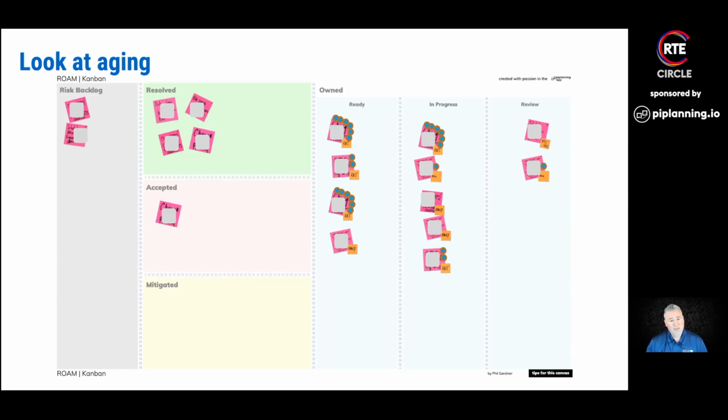The other thing, though, is to be aware that these are the things that are going to stop the teams from meeting their objectives. They've told you, hey, we can do this, but we're worried about these things. So I like to throw a little dot on a risk to represent each week or each iteration that's gone by. If the executive is walking down the hall, glances over, and sees six blue dots or little yellow stars on it, they realize, wow, six weeks have gone by and nothing's happened with this. This is increasing the risk of our objectives not being met.